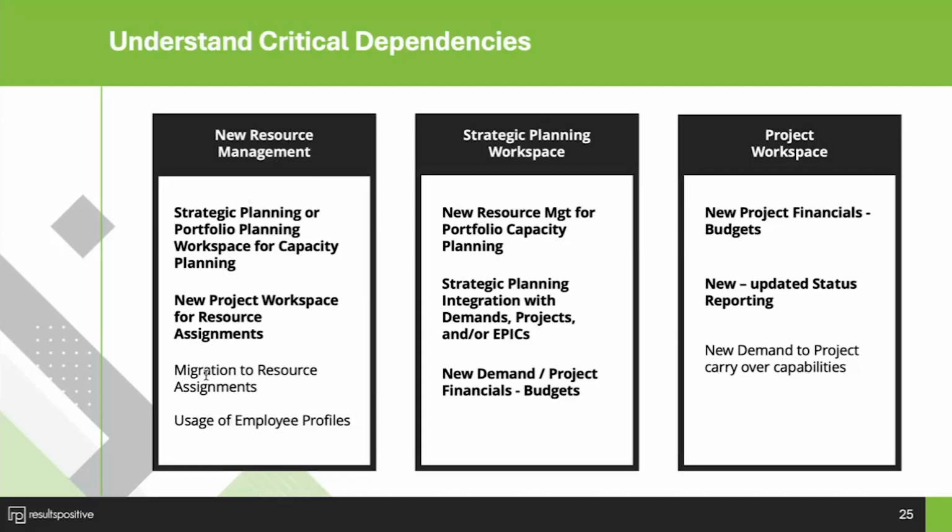There are other things that you'll do as part of the process. ServiceNow has a good set of scripts to migrate, say, existing resource plans to resource assignments, as well as the setting up of your employee profiles. So the big dependency there is making sure that if you haven't been using resource management, you identify all of your groups and roles, and identify what approach you want to follow for resource management, whether it be group-based or role-based.